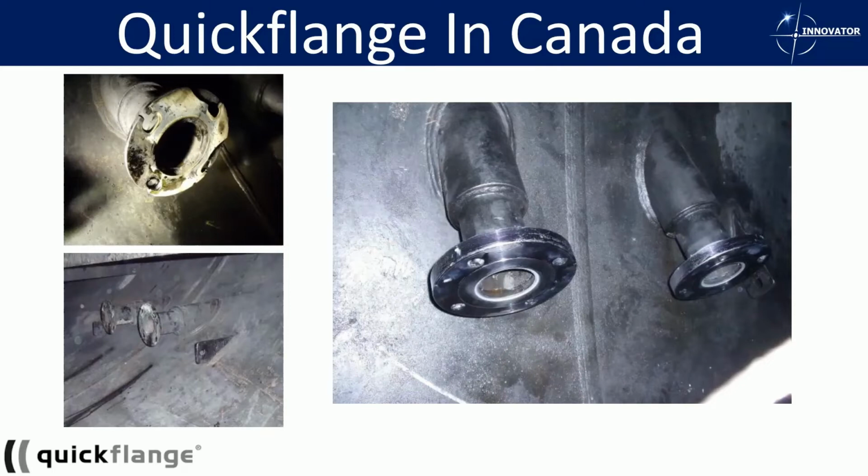The client had 3 vessels, a total of 30 flanges inside confined space. They had a massive critical path schedule. This project of replacing these 30 flanges was 3 weeks in their plan. Massive cleaning, steaming, and degassing of the vessels, confined space, breathing air for the welders, man watches. You can imagine the entire requirement for confined space welding and cutting.